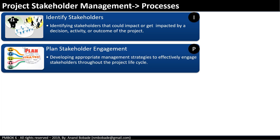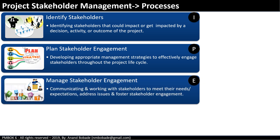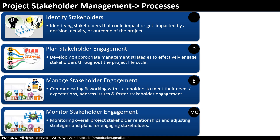Plan Stakeholder Engagement is under the planning process group. This is the process of developing appropriate management strategies to effectively engage stakeholders throughout the project life cycle. Manage Stakeholder Engagement is in the executing process group — this is the process of communicating and working with stakeholders to meet their needs and expectations, address issues, and foster stakeholder engagement. Finally, the fourth process is Monitor Stakeholder Engagement, under the monitoring and controlling process group. This is the process of monitoring overall project stakeholder relationships and existing strategies and plans for engaging stakeholders.